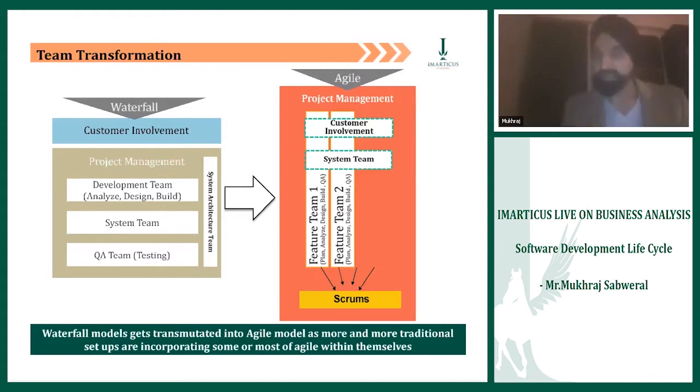I gave them that kind of work in which requirements are not to be built sequentially, hence they can work independent of each other. Each team has the same mix of skills. So each team has business analysts, designers, testers, coders, etc. So in the parallel working that they achieve, they can obviously develop the product for Airtel faster rather than in a waterfall model.